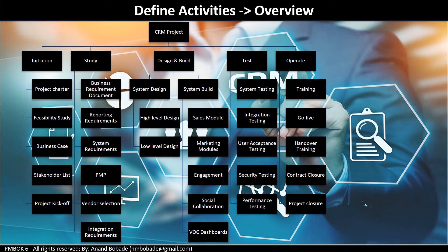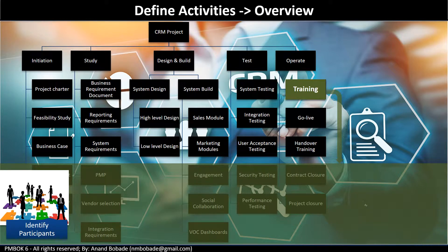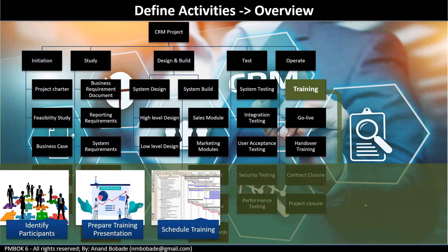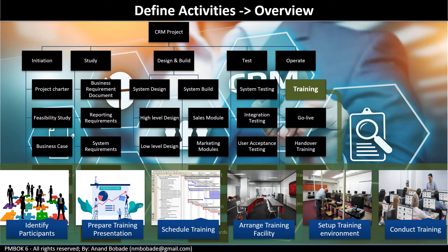Let's take the work package 'training.' Remember, training as a work package has a tangible value to the organization, and sometimes this work package can even be outsourced. The activities needed to complete the training work package are: identify participants for the training, prepare training presentation, schedule training, arrange training facility, set up training enrollment, and conduct training. All these will be activities to be executed to complete the training work package. Right now, we are not worried about the order of these activities.